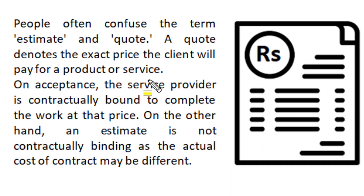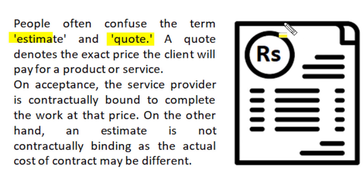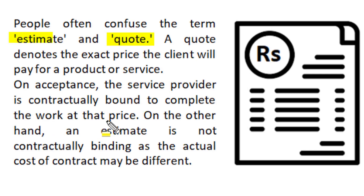There is a difference between estimation and quotation. A quoted price denotes the exact price that a client has to pay for any product or service, whereas estimation gives an idea about that cost. Most often, quotations are prepared only after estimation. If a quotation is accepted, then between supplier and beneficiary a contract is usually formed, and the service provider is contractually bound to complete the work at that price.